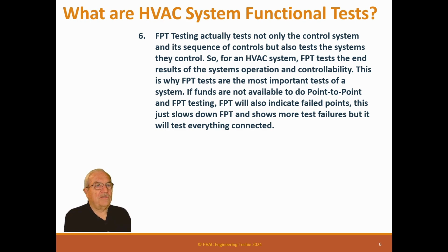FPT testing actually tests not only the control system and its sequence of controls, but also tests the system they control. So for an HVAC system, FPT tests the end result of the system operation and controllability. This is why FPT tests are the most important test of a system.